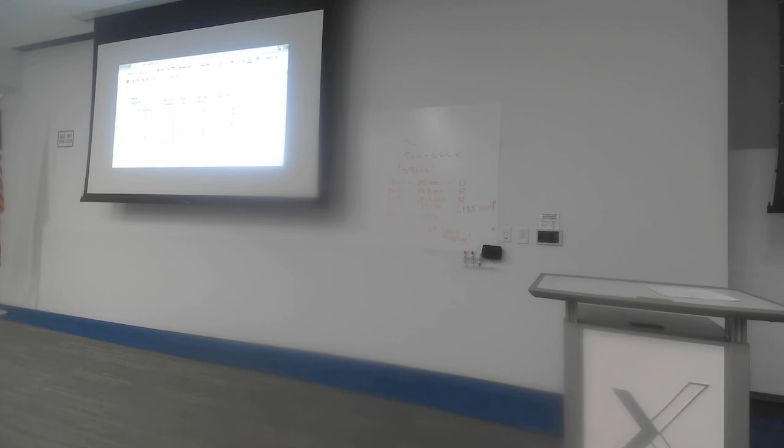In terms of total cost to me, the project manager, when I'm balancing out the cost of crashing activities and the actual amount of money that I've been getting from the client in terms of a bonus, I've got these two options here. They're both costing me €95. So you might be asking, well, what's the correct answer? What's the optimum schedule? Well, here's where your discretion could come into play, but the way that I would argue it is I would say that it's costing me the same, €95. The project client probably would like it in that day earlier, so I would go for this option here.